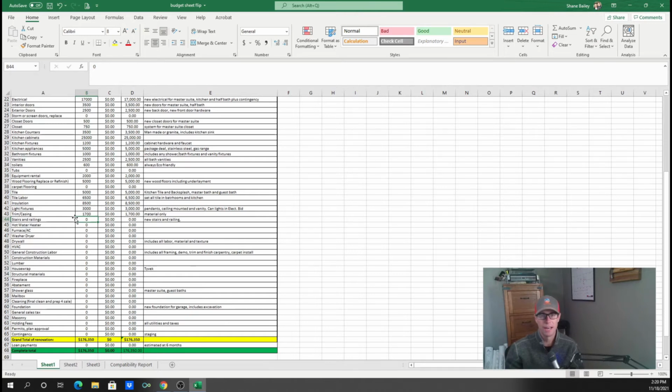We're not obviously trying to nail down numbers right now. If anything, go high. Don't be conservative with this on this level, because you want to see how tight you can squeeze your budget before you end up saying no way. Obviously, once you have plans in place, you can pull from the plans and do a better job of putting together a real budget. This is just a rough, off the cuff kind of deal. So I'm gonna go $4,500 here for everything.